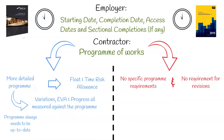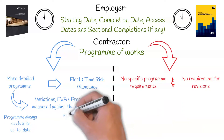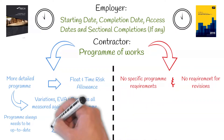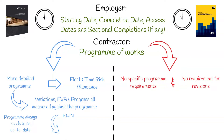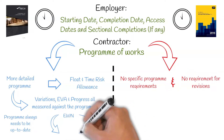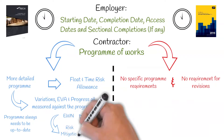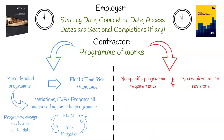A key feature of addressing risk to program extensions is early warnings. Under the NEC, these are submitted by either the project manager or contractor as soon as one or the other becomes aware of any matter which could affect the time, cost or quality of the works. These are usually followed by a risk mitigation meeting where parties will work collaboratively to mitigate risk, a task which would be extremely difficult without an up-to-date program.